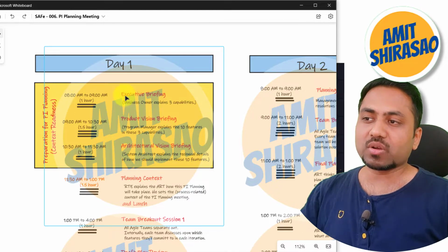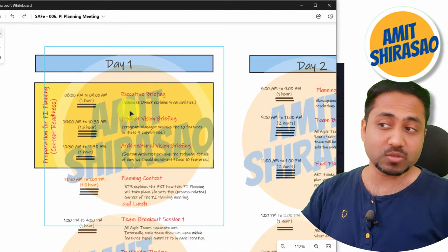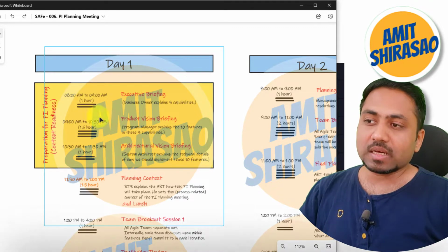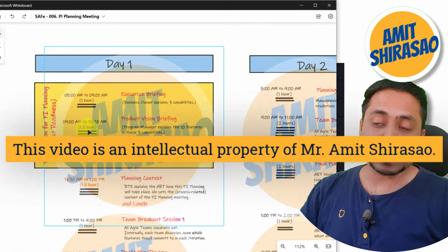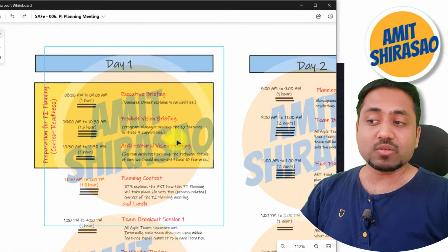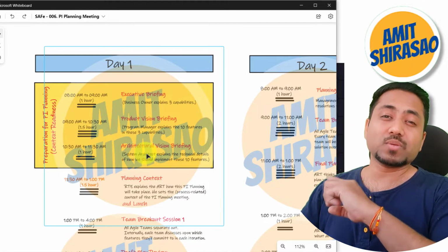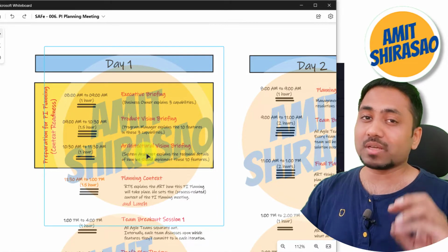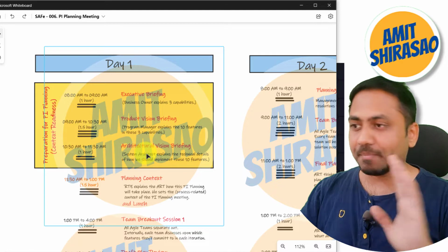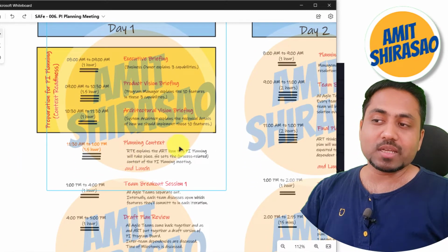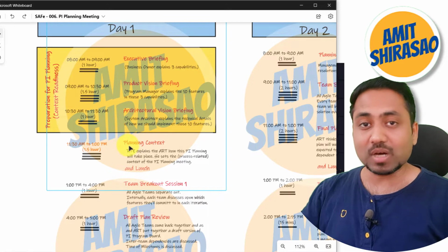Your executive briefing, given by your business owner, happens for 1 hour, as I explained in my previous video. Then the product vision briefing happens for 1.5 hours, and then the architectural vision briefing happens for 1 hour. For all these 3 briefings, please refer to my previous video. I've given examples also, and I've explained it in great detail over there. Now going ahead, after that, your RTE basically explains the planning context to the ART.